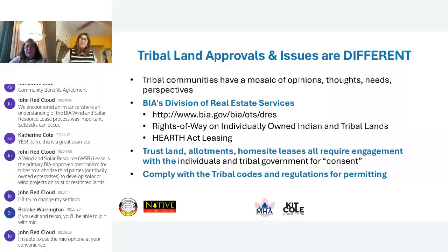Sometimes it's with the tribal council. Again, every tribe is different, and every tribe enacts their HEARTH Act with certain types of provisions. Ultimately, when that agreement is approved, it still has to go through a shortened review at the secretary level. But that's also very important if it's a HEARTH Act tribe. And a lot of times developers or people who are not familiar with development don't know that.